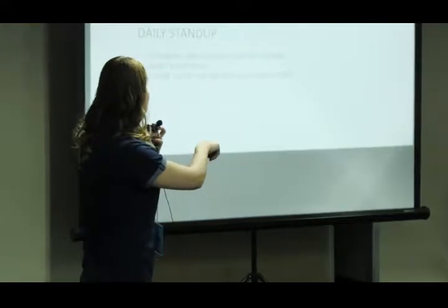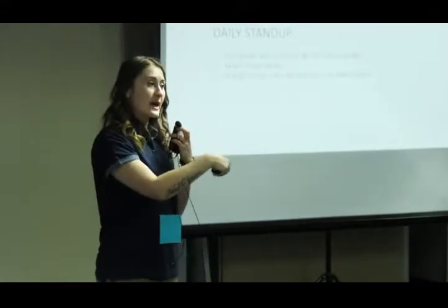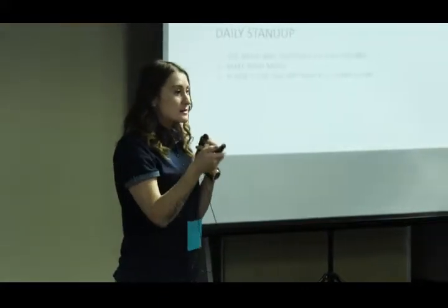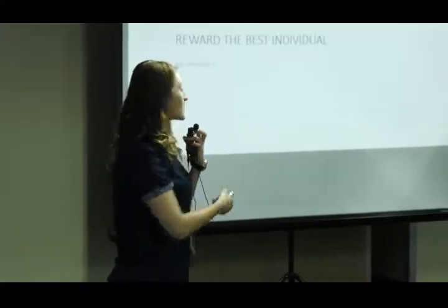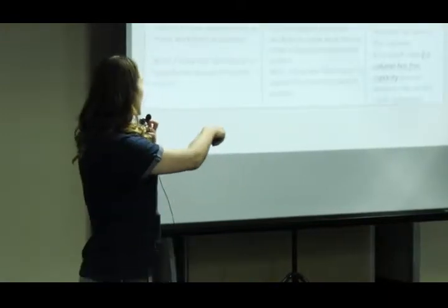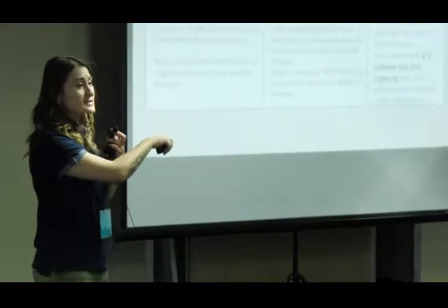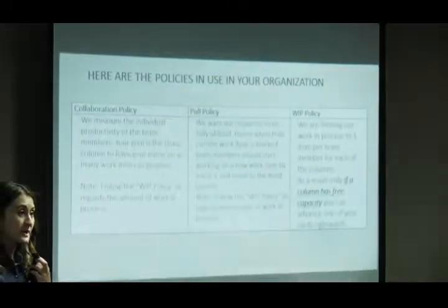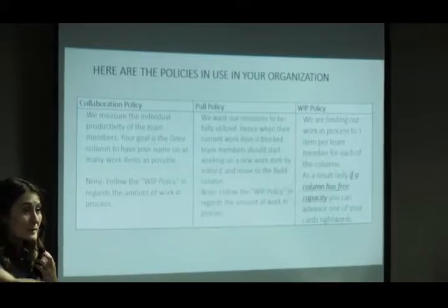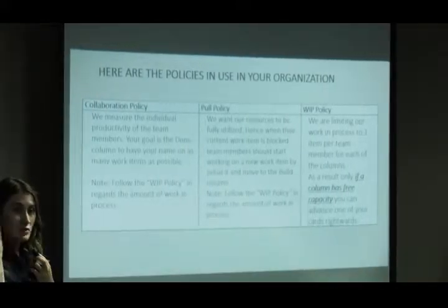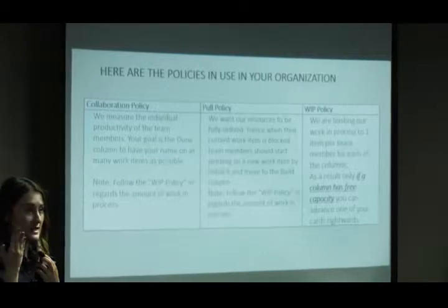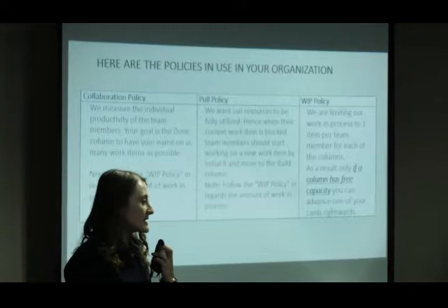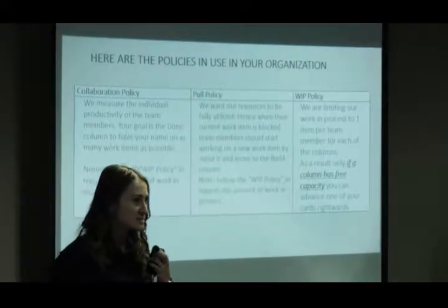So, just to recap, we're going to use what was tasked in the first round. You're going to action it out, and then do the column count and lead time. But we're going to focus on our pull policy. We still want our resources to be fully utilized, but we can only pull work in when our WIP limit allows for it. That means only 4 items in that specific state. Everyone understand that? Okay, cool. So let's get as many done tickets as possible.